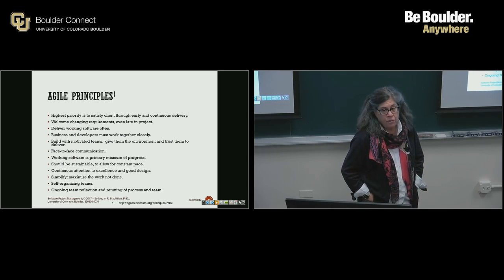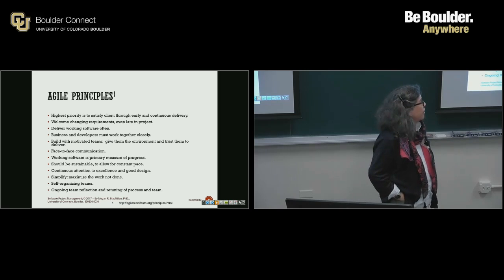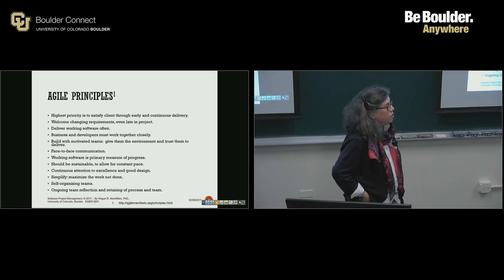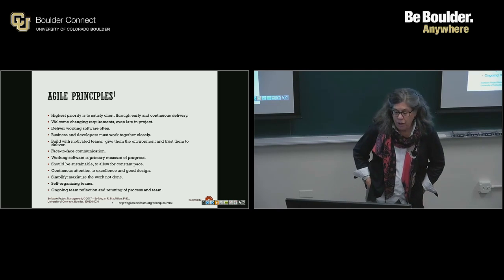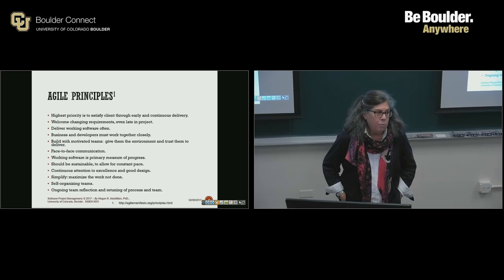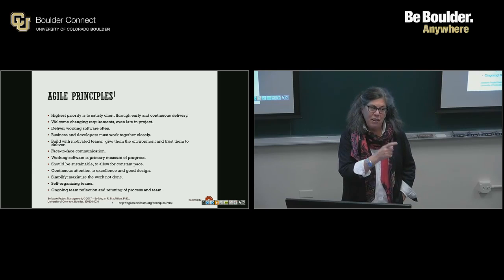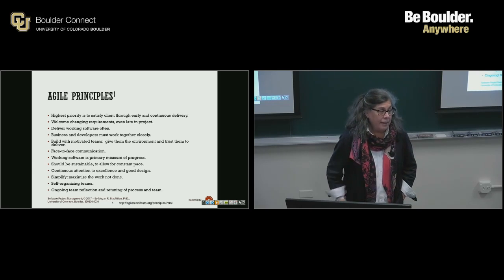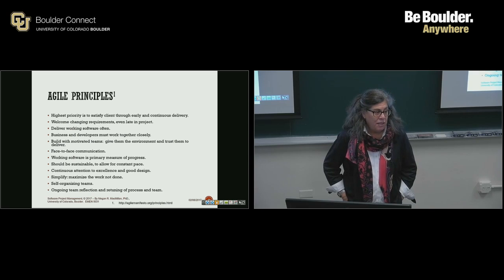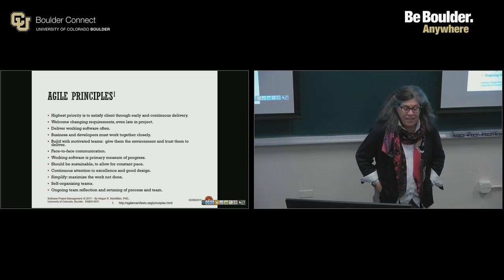Sometimes the face-to-face is on, as you saw, like Zoom or Hangouts or Skype or whatever is handy. Working software is your primary means of progress. If it's not working, you haven't progressed. If you can't show me something, I don't know if you did anything. And sometimes it takes a long time to get something out there that works. But if you don't get something out that works in 2 weeks or 4 weeks, you're never going to get anything out to me to see. So you have to get stuff out there that works often.